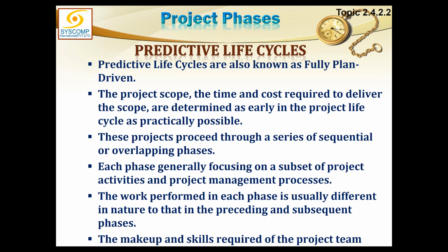Predictive life cycle is for those projects for which you are pretty much sure what you want and how it will be done. You don't have to think a lot. Meaning what? That you have the requirements very well known. It is a very structured project and you don't have to fabricate any new plans. You have to construct a house, and for that, you need drawings. If those things are available, you simply go ahead with the plan. Such very structured projects are ones for which you can predict almost everything.